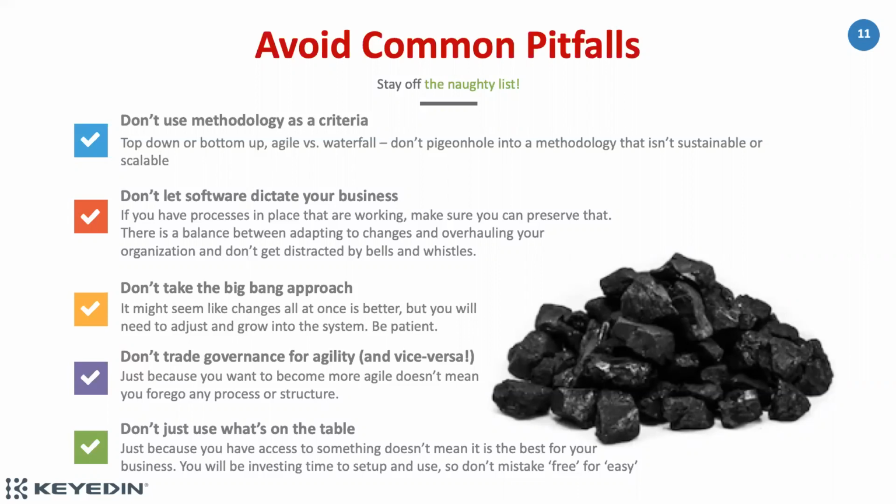There's nothing more frustrating than embarking on a large-scale search for a tool, maybe going through an entire RFP process, looking through a number of vendor demos and maybe even a trial, only to get to the point of purchase and procurement and find out that someone on the other side of the organization has also been doing a search, and theirs is going to take priority, or you're going to be mandated to use a tool that the CIO has already selected. So just make sure that you've got that support up front. It'll make everything smoother.